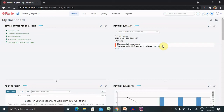Work should not begin on the successor user story until the predecessor user story is completed. User story states are rolled up to help you know when a predecessor is complete and work on a successor can begin. The blocked predecessor state is easy to see from most views. You can create a new user story as a predecessor or choose an existing one — this is also possible in vice versa.